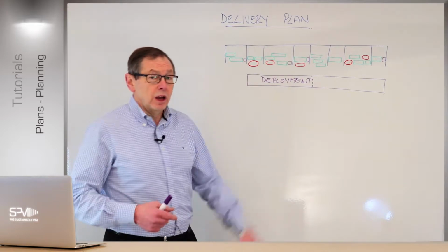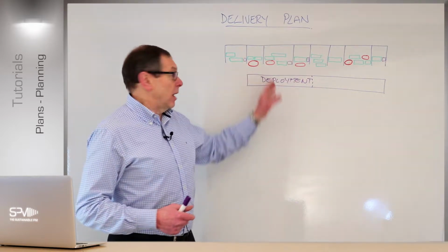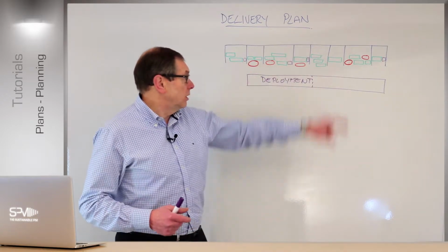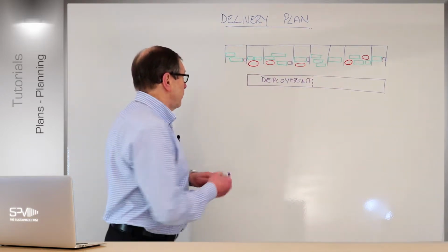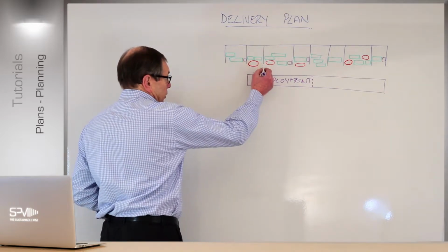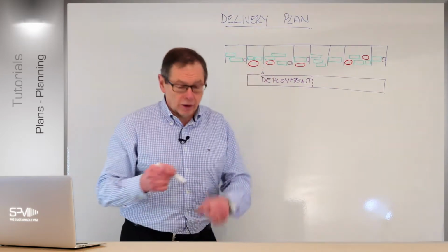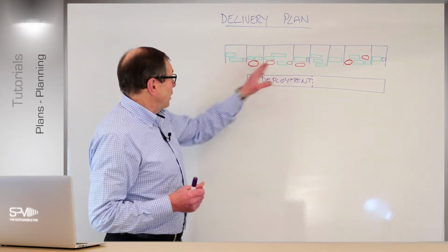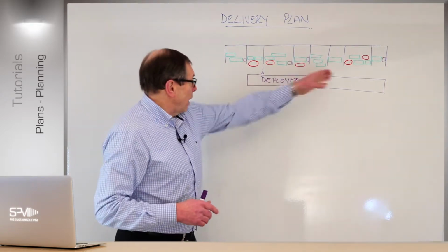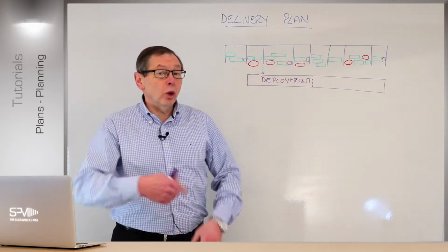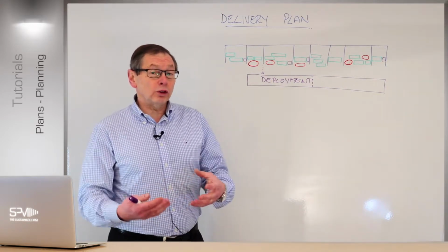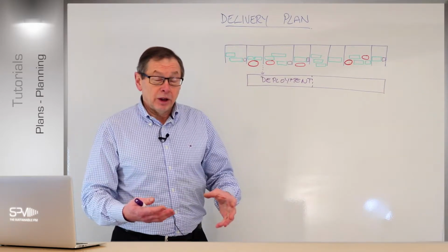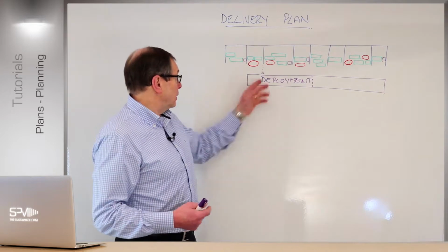That's the situation. So whatever you feel you need about deploying, or when you need to deploy, keeping offline in little independent segments, or deploying straight from, for instance, the second increment, we might be deploying something in here. It all depends on how it works. Another thing to note, of course, in my delivery plan, that work packages, though I haven't done that here, but time boxes can also overlap each other. If you've got the resources and you know how to manage the resources, they can overlap. You can run parallel systems that might be doing different work.